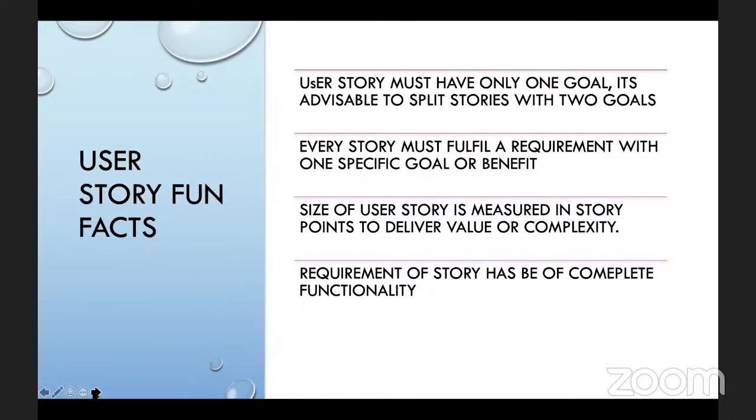So when you're writing, as a customer, I want to have the ability to pay my tithe with my Visa, MasterCard, with PayPal, with Zelle, then you know that now you're going overboard, right? It must address just one specific goal. And then if you have something else to work on, make sure that you write another story that will take care of that as well, right?